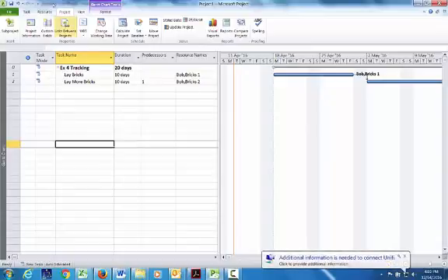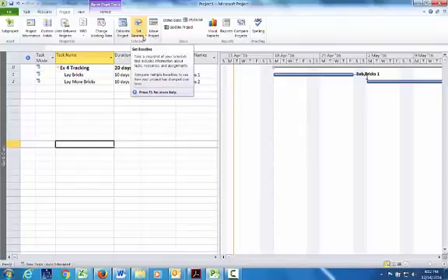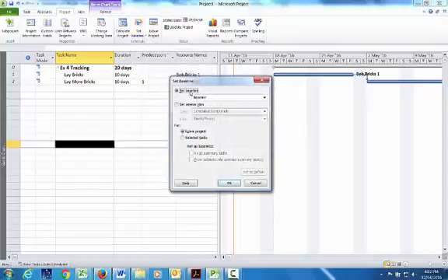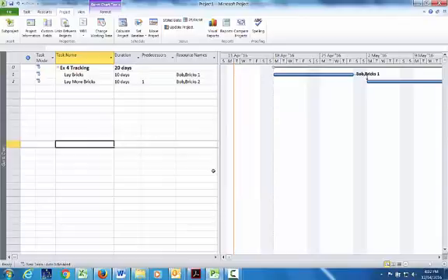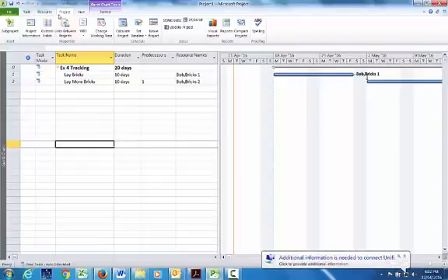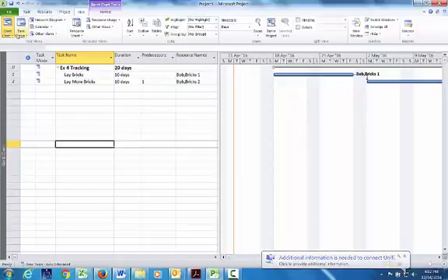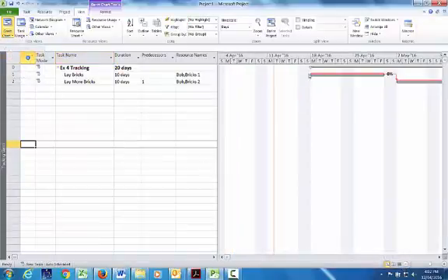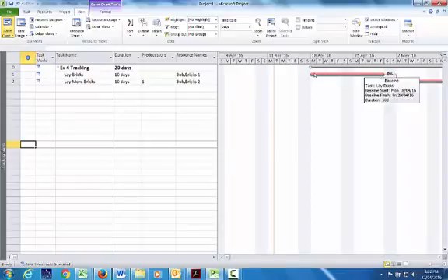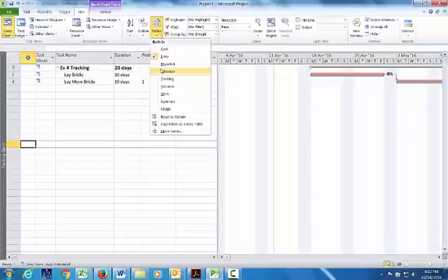We need to set up the project baseline. So under project, you can see over here, set baseline. You can customize it based on names. You can change it with a date, etc. But to start off, we'll just set baseline, and we'll call it baseline. You can see there are others there. So now we have the baseline in play. We go to have a look at the tracking Gantt chart. If we're not sure where to go, view. We're in Gantt chart view. We want tracking Gantt, and you can see here, this is the planned activity, and this is the actual activity in red there. It's on the critical path, that's why it's in red. The table we want is the tracking table.